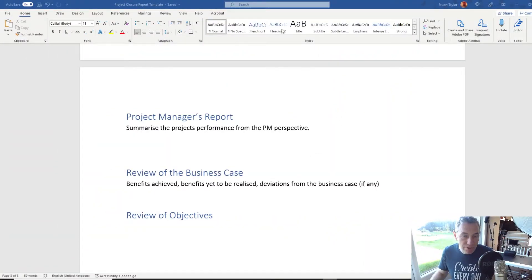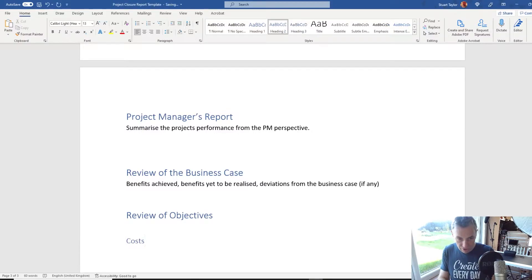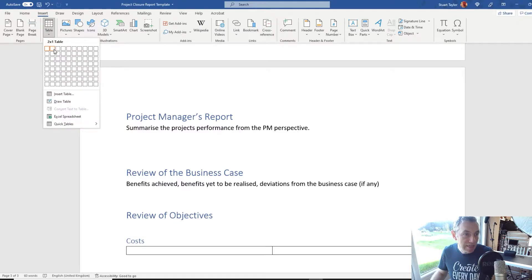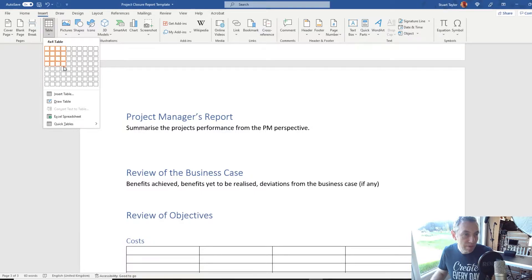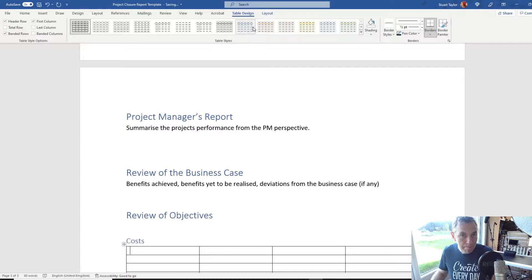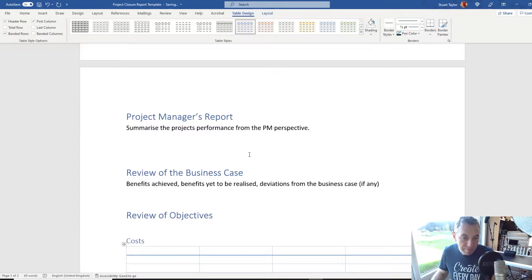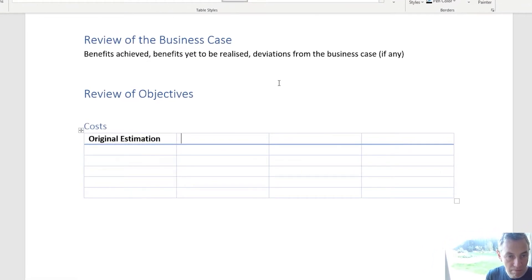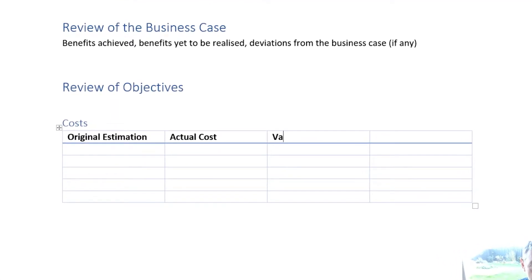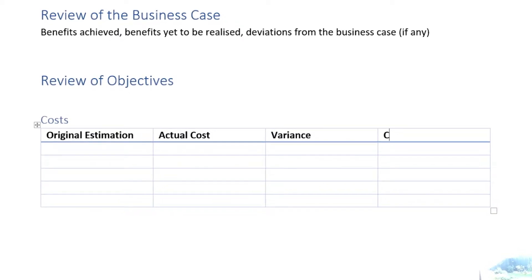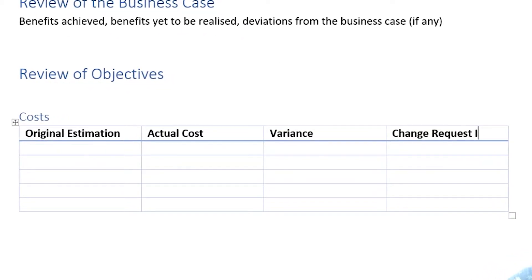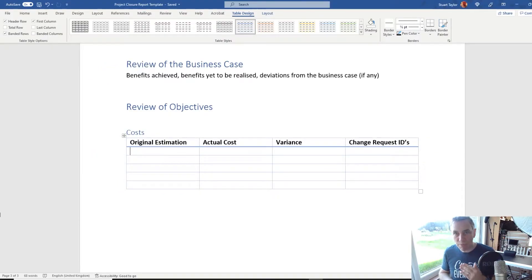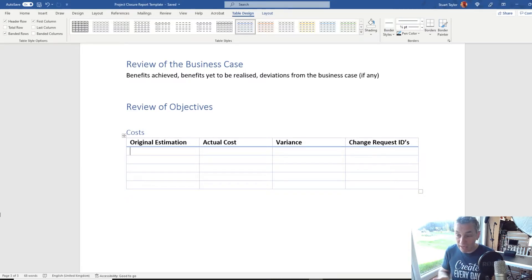We're going to go to Heading 2, which will create a subheading. Let's start off with Costs. Insert a table with four columns and a few rows, and select the same table design used earlier. The column headers are: Original Estimation, Actual Cost, Variance, and Change Request IDs. You can just put one line entry with the original budget estimation, the actual cost, the variance, and the change request IDs that impacted on that.